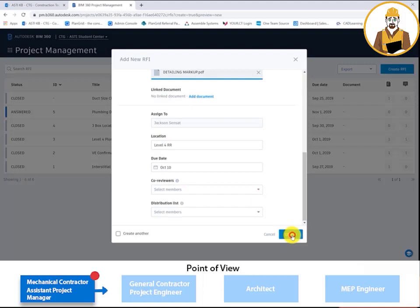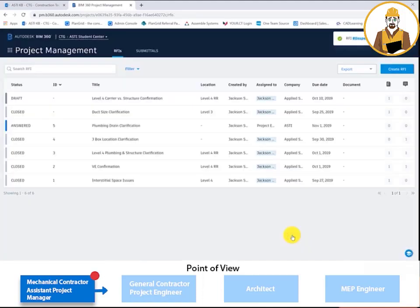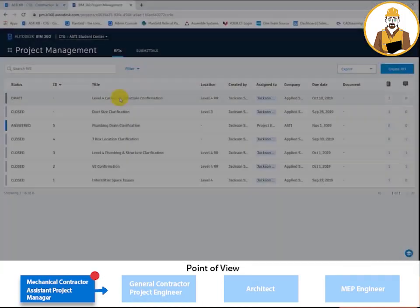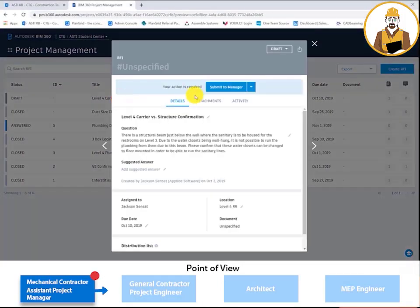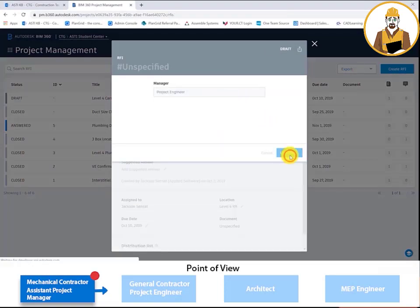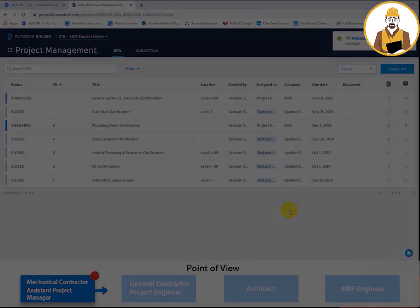From there, the assistant project manager must submit the RFI to the manager. The manager in this project is the general contractor's project engineer.